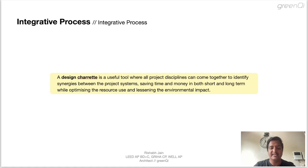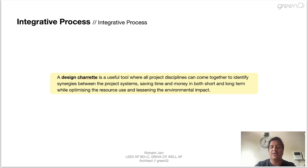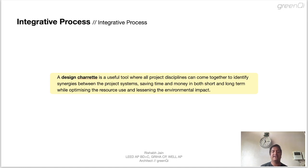Now that you know what an integrative process is, it is important to know what a design charrette is. A design charrette is a useful tool when all the project disciplines come together to identify synergies between project teams, saving time and money in both short and long term while optimizing resource use and lessening environmental impact. It is basically when all the stakeholders meet before the beginning of the design process. For example, an architect recommends using a material which is expensive but environmentally friendly, but the contractor, who is also part of the discussion, knows the structure cannot be made with that material and recommends a different material which is cheap and also environmentally good. Such practice will help avoid issues in the long run and help save funds and resources. Please pause the video and take a note of this definition.